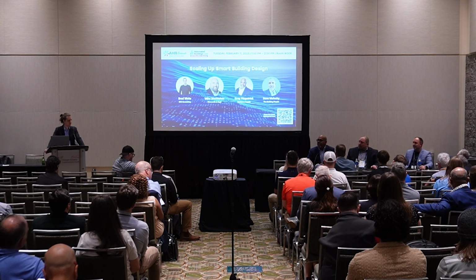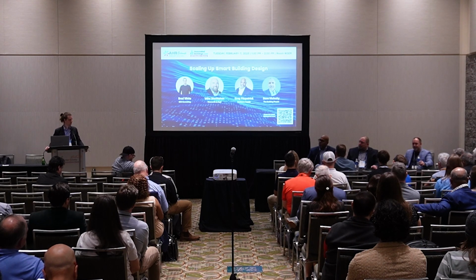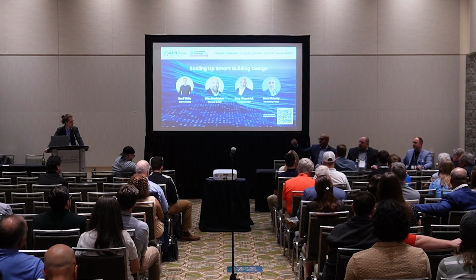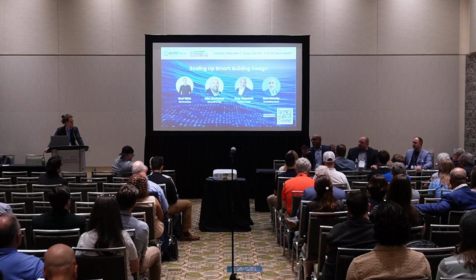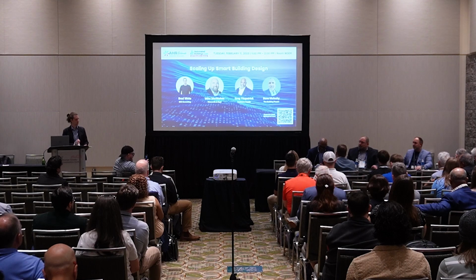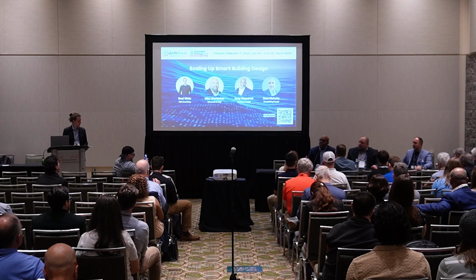So what we've done is try to spin the process such that they understand what needs to go into the construction documents now, when you look at your specification. Products here, qualified systems integrators here. It's very important to separate the two. Here are your open products. Here are the qualified systems integrators in your market that should be bidding on that project. Well, how do you get systems integrators to bid on a project? You put together a good set of documents. And what should be in a good set of documents? A clear and concise specification that tells a story and assigns work.